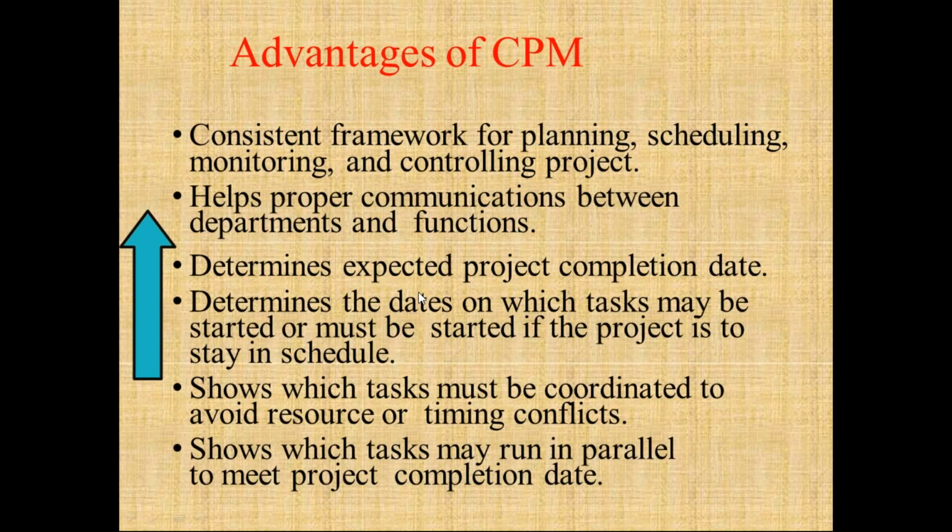It determines the date on which a task may be started or must be started if the project is to stay on schedule and not be delayed. It shows which tasks must be coordinated to avoid resource or timing conflicts. It also shows which tasks may run in parallel to meet the project completion date. So these are the advantages, and this is the information we can take from the critical path method.